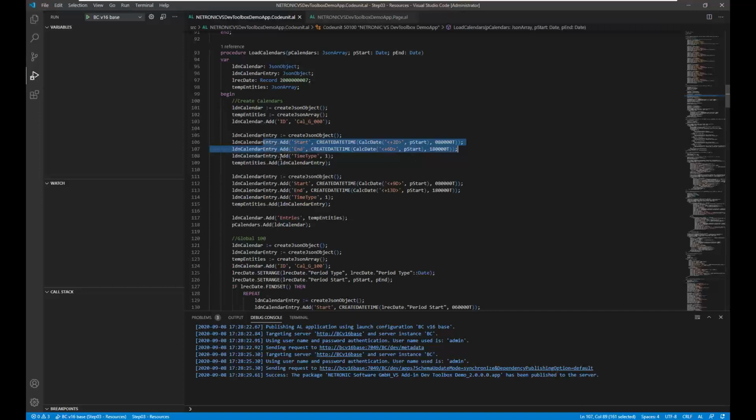In this case, it's working time, because the standard value for a resource without a calendar is complete non-working time. So with all the calendars, I can define all the working times. Here I have two entries starting at a certain date, at 8 o'clock to 6 o'clock in the evening, two times. And this is my calendar G000.